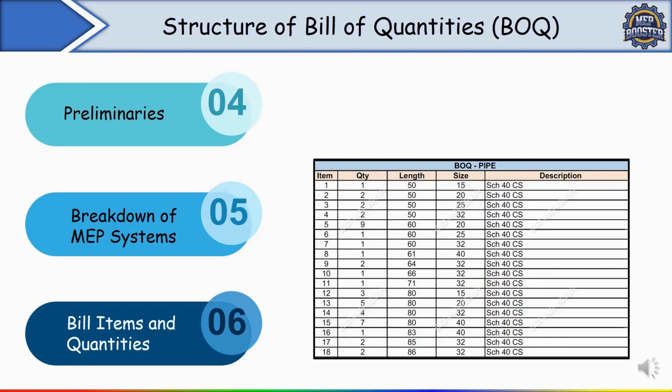In the same way for ductwork. Ductwork is generally measured in square meters, and we need their quantity. For that you have to calculate the material takeoff, which I have already discussed in the second module. You can go through that and you will get the idea.